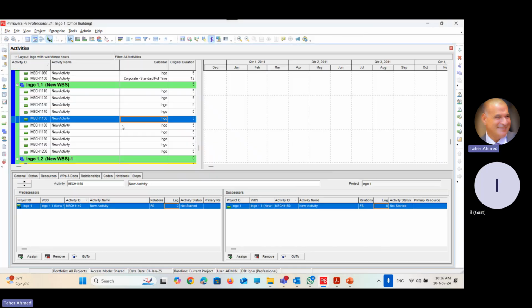Right. Now, to make a proper import, the first step is to close the project you are opening now. Why? Because when you import, the file will be imported as an open project, so it will be open plus what you are opening now. So it's better to close all the projects in your view. How to close it? File, Close All.